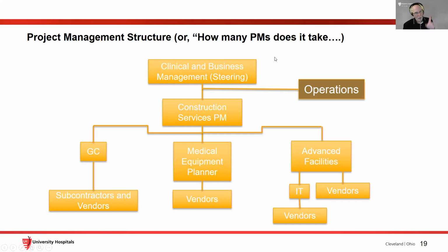So we've gotten better at this, by the way. When I first started, it was a challenge. It's gotten a lot better. So now there is someone from the operations side of the house, someone who's going to be responsible once this is who we hand the keys to, this operations team. And there will be a project manager, sometimes from the PMO, sometimes not. There will be an operations team that will be responsible for opening the doors, setting things like the hours of operation, and handling things like credentialing and staffing and things like that. That's all on this side, preparing for the day when the building is open.